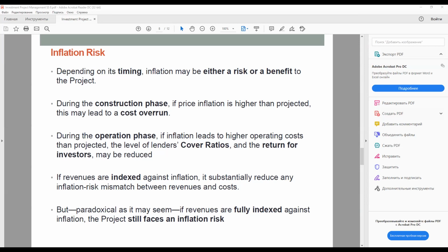So based on the above, the best choice for the off-taking contracting authority is to index the contract payments against inflation in proportion to the operating costs, which are subject to inflation. This cannot be done precisely, as can be seen comparing case D and case C, because the ratio of operating costs to revenues in the table is fixed at 60%. In fact, the operating costs are 60% of revenues in year one, but this percentage gradually climbs as time goes on and increases faster the higher the inflation rate. It is not normal practice to change the indexation percentage for each year.